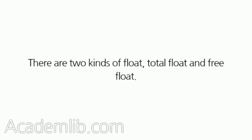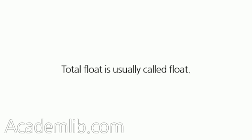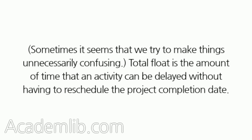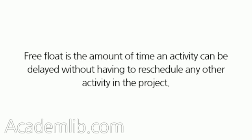There are two kinds of float: total float and free float. Total float is usually called float. Total float is the amount of time that an activity can be delayed without having to reschedule the project completion date. Free float is the amount of time an activity can be delayed without having to reschedule any other activity in the project.